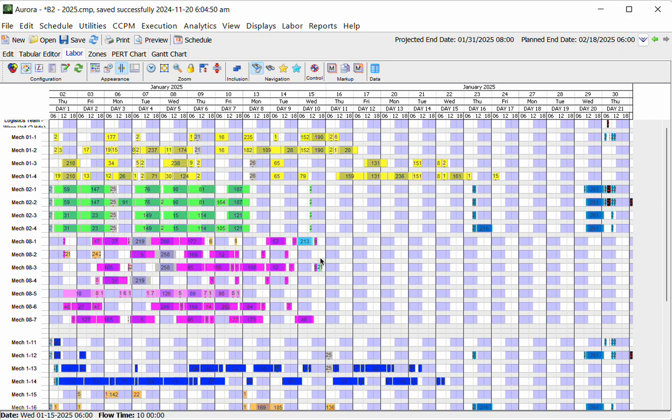The other thing worth noting is here I am just building one unit. And with a model like this, usually there are a whole bunch of units going on, interacting in sequence. So usually, for example, this labor group would do the green work for this unit, and then they'd probably go and do the same green work for another unit in this gap before coming back to the teal work.